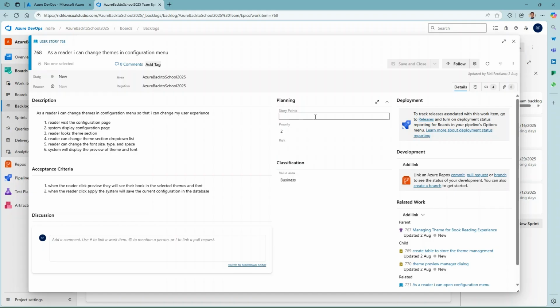As a rule of thumb, if you have more than five or more than six steps, you can put the story point above the step number. So if I have six steps, I will give eight story points. But this is a rough estimation.